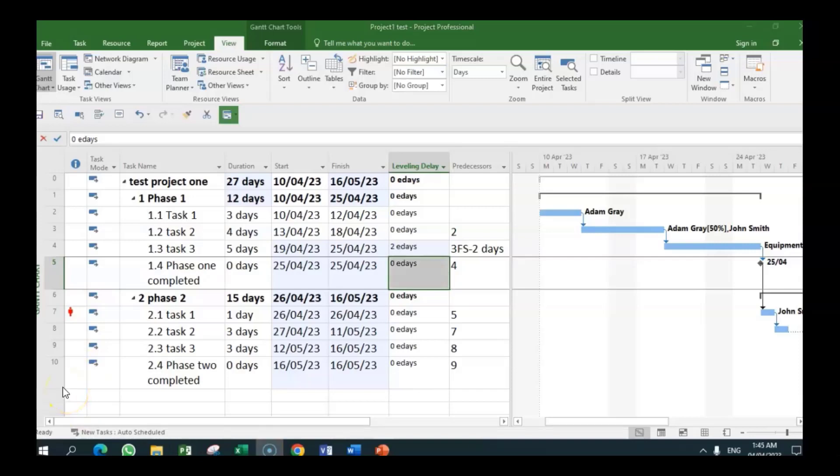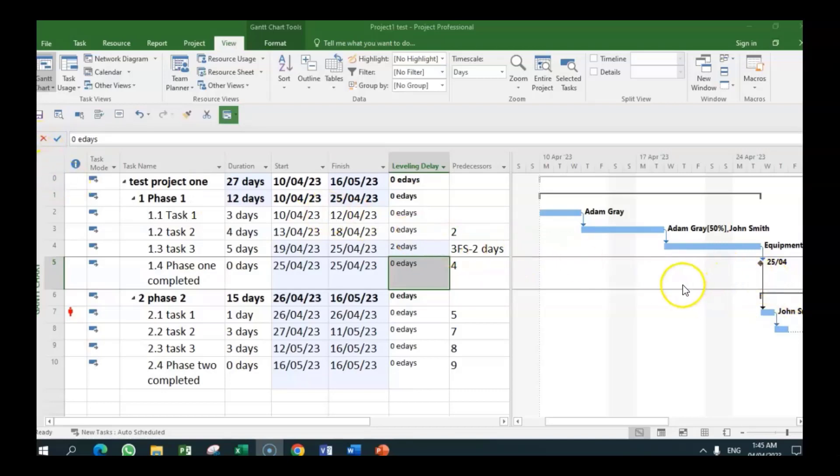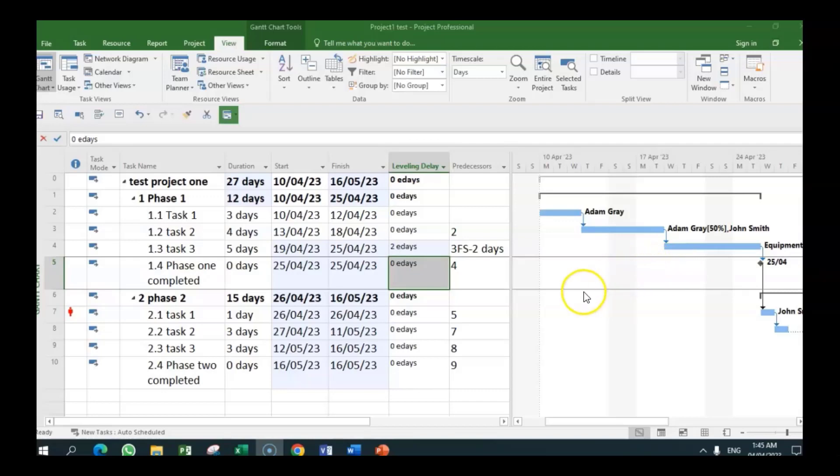So you have just seen some of the ways we can resolve over-allocation of resources. Some of the things we discussed: replacing over-allocated resources with another resource, replacing the value in the units field, adding additional resources to the task so that both resources share the work. We discussed that. We also—but we didn't discuss using the 'as late as possible' constraint, but for now it's really going to that. Accept the resource over-allocation, which is one of the things I have said. If it is not significant, increase the number of project—. So all these are some of the things we can do. If you like my content, give it a thumbs up and share.